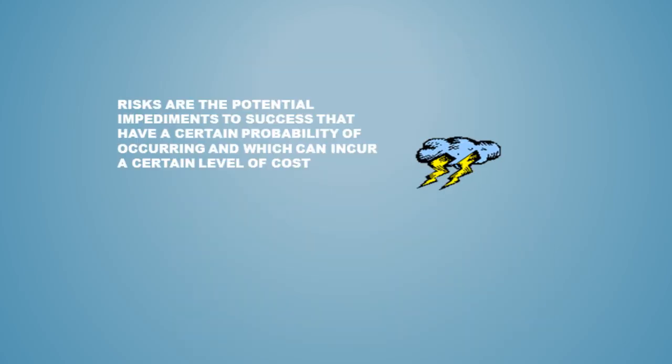Risks are the conditions that jeopardize the goals of a project. Risks can be identified by how likely they are to occur and what the impact would be if they do occur. For example, requirements could be incomplete or incorrect. Poor decisions could be made. There could be a lack of adequate staffing, a lack of business domain knowledge. The team could be using unfamiliar or unproven technologies.